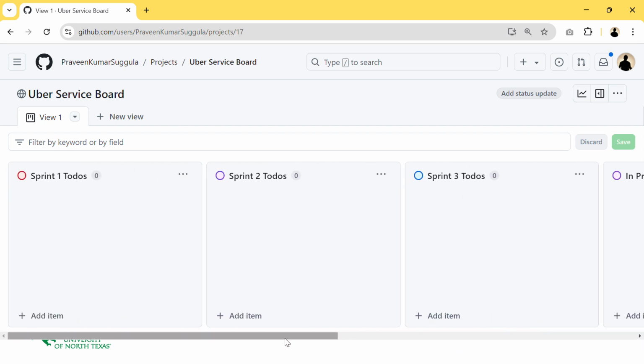Basically, in our software engineering project, we are taking an existing project and adding unique features into that. That's our work, right? For example, we have 12 unique features, which means 12 user stories. Out of these 12, in sprint 1, we are planning to do 4. In each user story, there are separate tasks, which are smaller work items, helpful for tracking our work as well as easily estimating them.